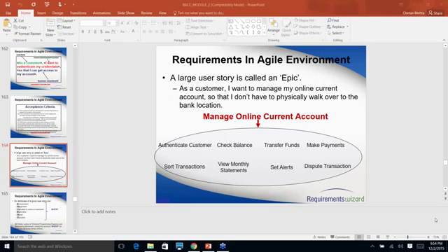So Chetan, I was actually reading something on it, and the way it explained was that you take the smallest user story and give it a relative point. Yes. And then compare it to that. Whatever your smallest user story is, the large and your epic would be compared to that. Right. We'll talk about how to do an estimation, most likely tomorrow. But that's one way you can say which one is large and which one is small.